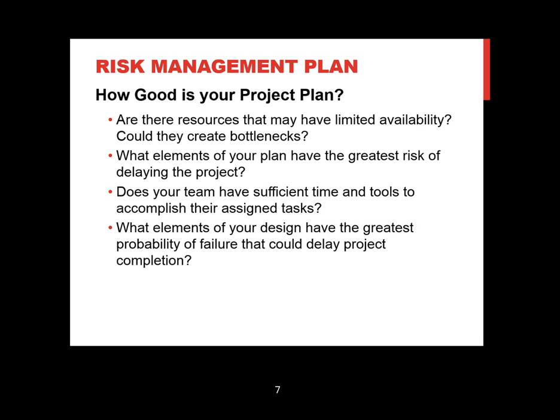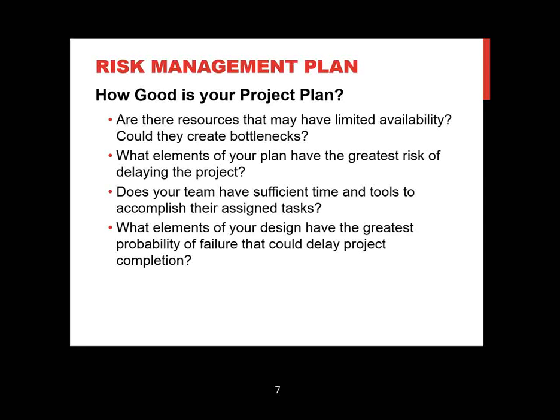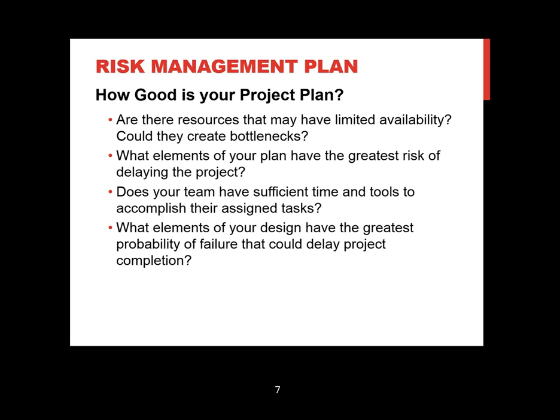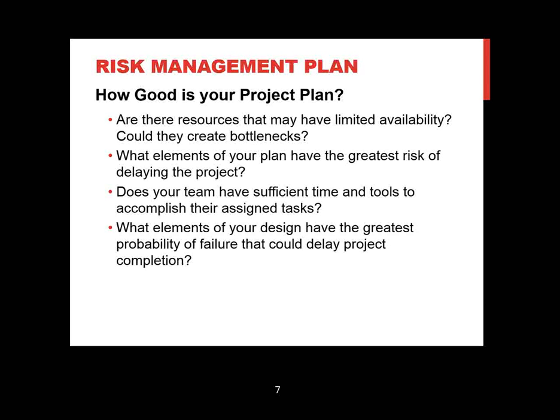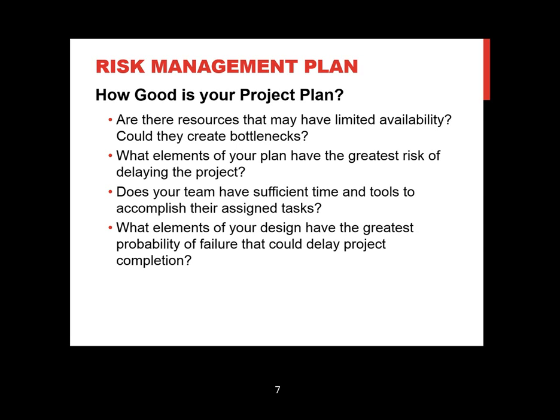Also, as you look at the elements of your plan, which of those elements have the greatest risk of delaying your project? Whether it be, for instance, team members that have to be gone for extended periods for training, or maybe, in the case of our college teams, student athletes who have to go off to conference championships, and that can all have an impact on getting a project done. Machines not being available in the shop, material being back ordered. These are all things that have to be looked at.